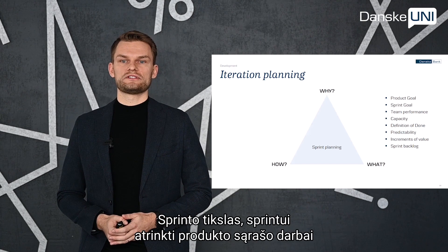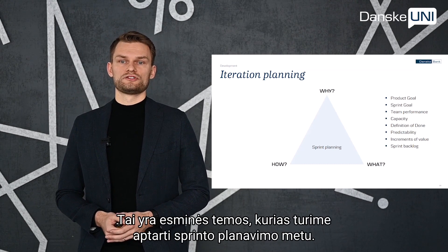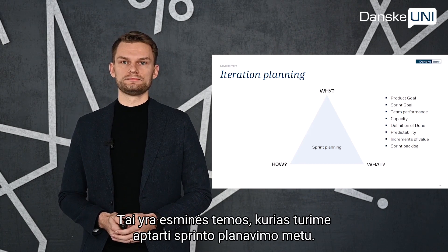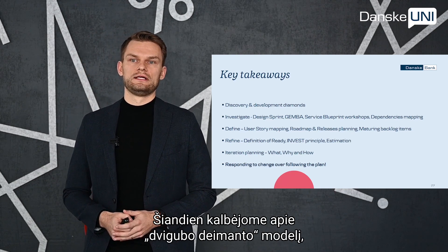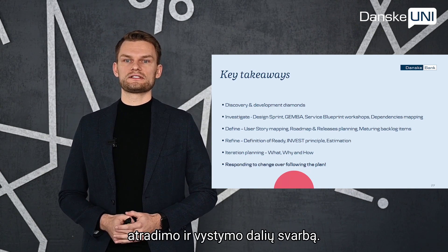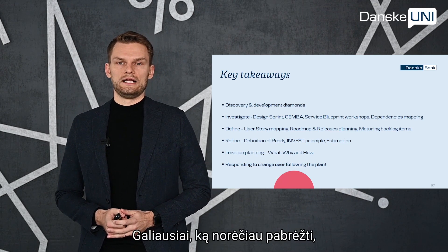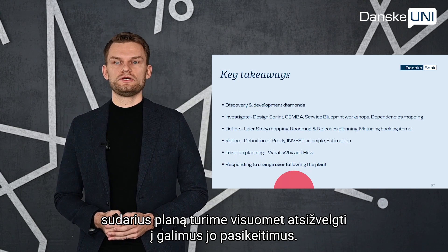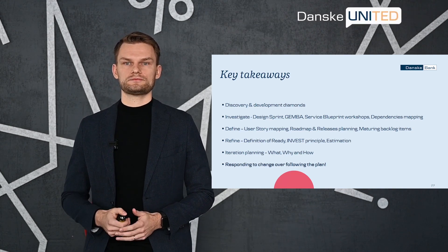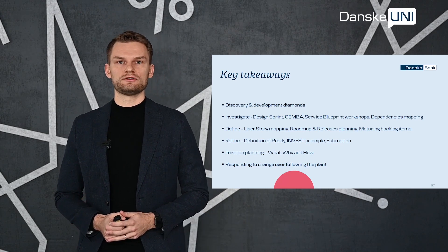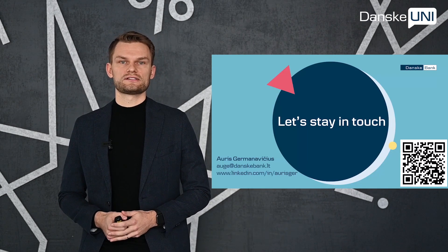This is often done by decomposing product backlog items into smaller work of one day or less. How this is done is at the sole discretion of the team members — no one else tells them how to turn product backlog items into increments of value. The sprint goal, product backlog items selected for the sprint, plus the plan for delivering them are together referred to as the sprint backlog. These are the main topics to cover during iteration or sprint planning. In this video, we have talked about the double diamond model, the importance of discovery and development parts, different phases and techniques in the discovery diamond, and we also touched upon iteration planning. What I would like to emphasize is that we have to always be responding to changes over following the plan. As soon as we notice that the plan needs adjustments, we must take them into account. Don't hesitate to reach me out in case you'd like to learn more.